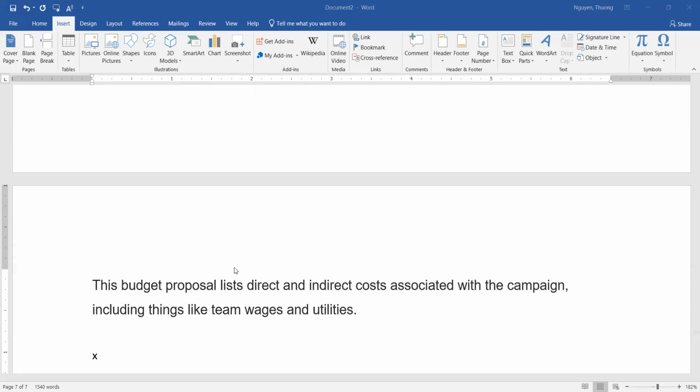So let's move to that template and see what is going on right here. Budget proposal example. Proposal organizers: the name, department: marketing, project name: social media campaign announcing new products, date: March 1st. Project objective: announce the launch of the company's new product through social media, develop both paid and organic social posting strategies for Instagram, Facebook, and LinkedIn platforms. 3 months long campaign. Cost element: direct cost, software, indirect cost, other expense.